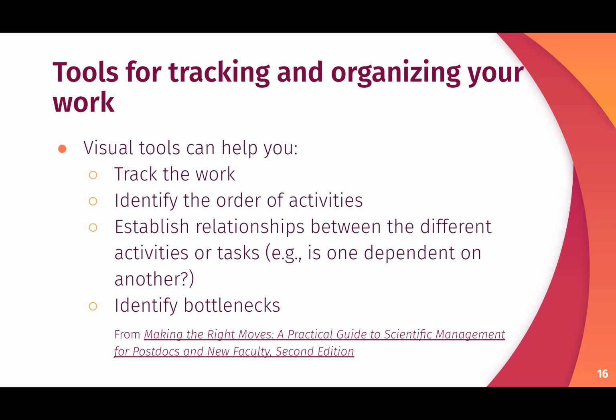It allows you to establish relationships within different activities or tasks. Again, I would talk about, like, should task A be done before task B, because we need the results of task A in order to complete task B. And then identify moments where you will have bottlenecks, where you have too many things coming at the same time, where you may encounter scheduling issues, things like that, and just know that those are there so you can plan around them. And having visual tools really helps you because you can actually see it as opposed to it being abstract.